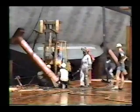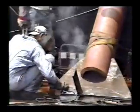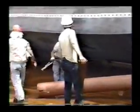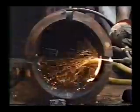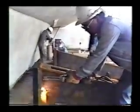At what wind force are they protecting the cargo? Well, we calculate the wind force, and from the wind force we calculate a certain acceleration force, and for that force we are welding the sea fastenings. In this case it was 85 knots, which is a hell of a lot of wind. So you're absolutely sure the cargo is safely secured aboard the Mighty Servant 2? Oh yes, it is, I'm sure.